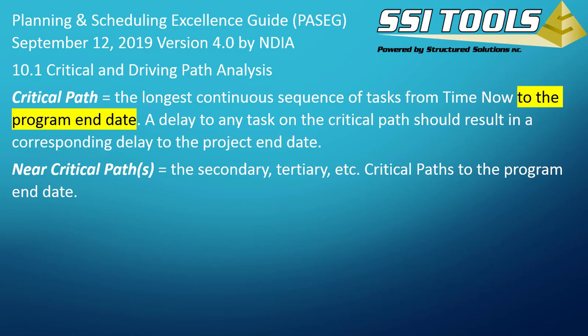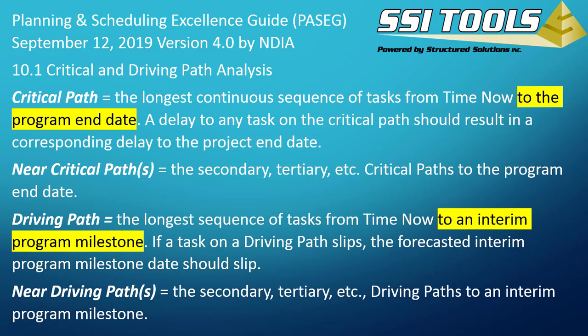A driving path analysis is identical to the critical path, except it's the longest sequence of tasks from time now to an interim program milestone instead of the end date of the project. In other words, you get to pick the end date and the analysis is performed to that point, ignoring all tasks that start after that point in the schedule. And as with the critical path, you have parameters that define secondary and tertiary, or near driving paths, as well.